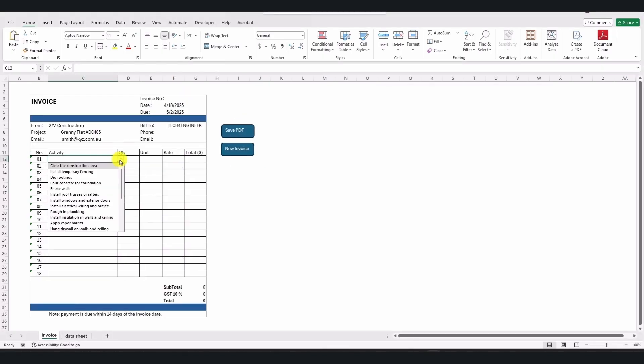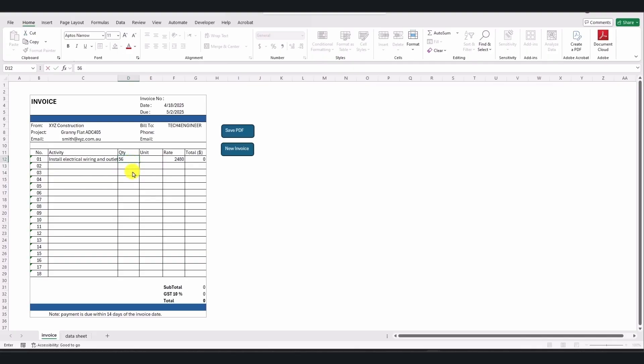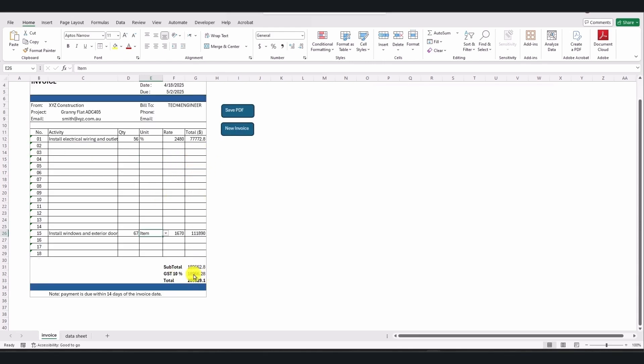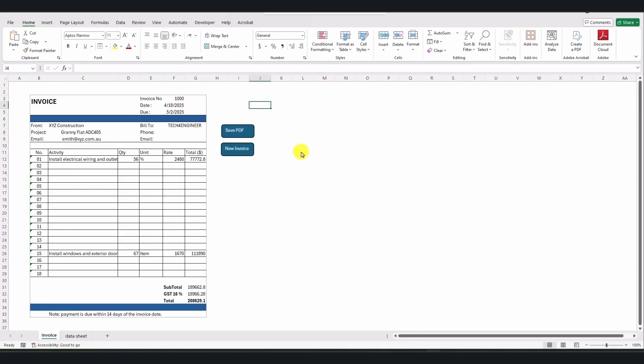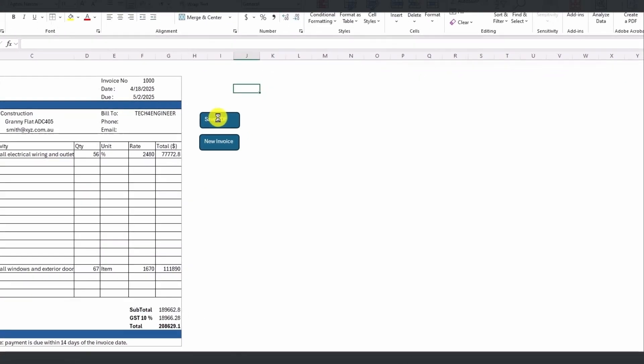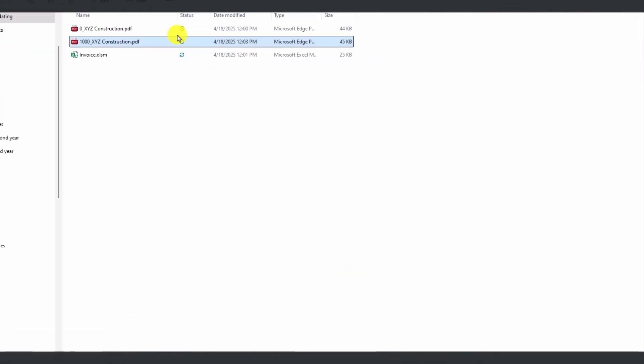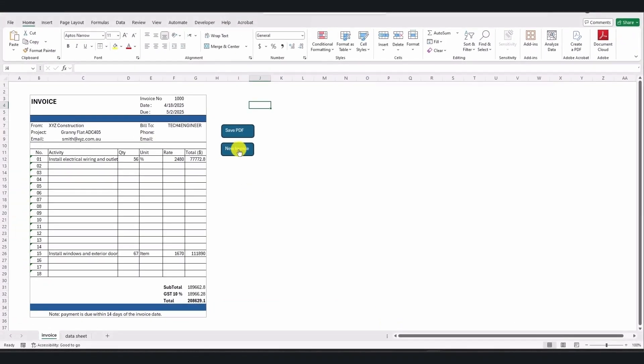In this automated invoice, we have an activity list. The rate or price based on the contract will automatically appear. Simply enter the quantity of completed activities and select the relevant unit from the list, for example square meter, cubic meter, percentage, thousand bricks, and more. It automatically calculates the subtotal, applicable percentage, and the grand total. It also shows the invoice number, for example 1000. There are two buttons included, one to save the invoice as a PDF and one to generate a new invoice for new activities. When you click Save PDF, it automatically saves a PDF copy for you. When you click New Invoice, it clears the current invoice and makes it ready for the next day.